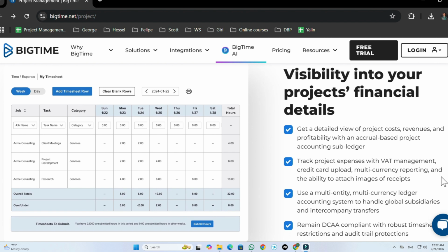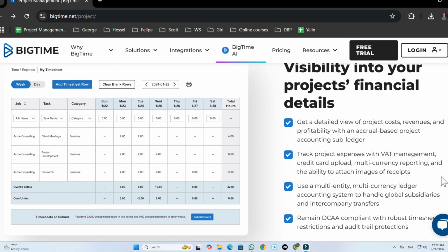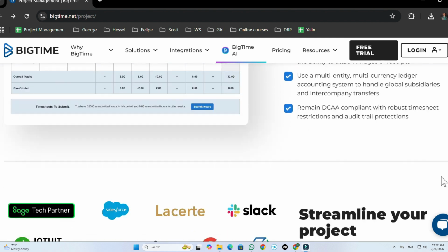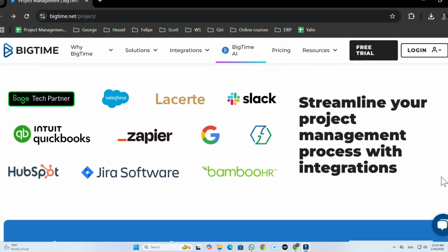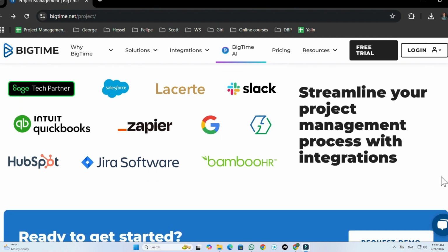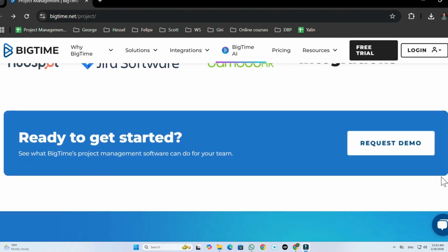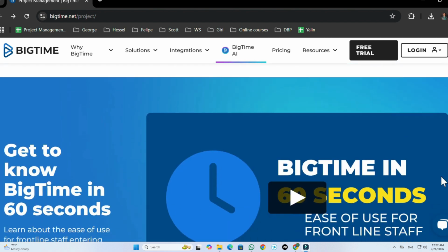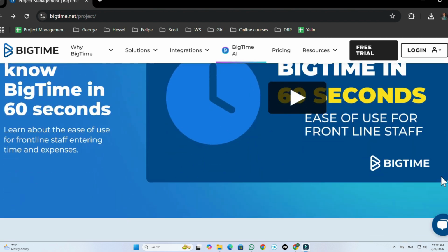Manage your team resource planning. 1. Go to the Resource Management or Staffing tab. 2. Use a calendar-style layout of team availability. 3. Use drag-and-drop tools to assign tasks or shift workloads. 4. See who's overbooked, available, or on time off. 5. You can also schedule future work based on team capacity.